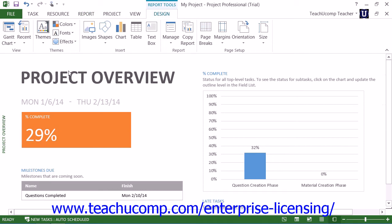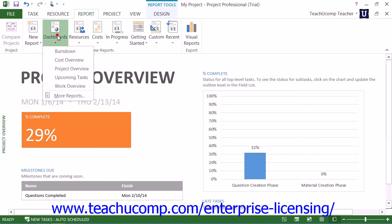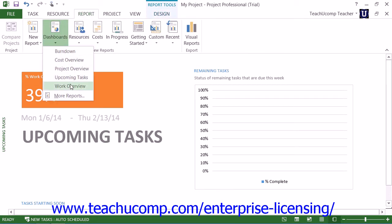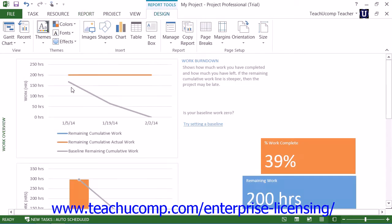The Project Overview is a report that shows how much of your project is complete. It also shows upcoming milestones and any late tasks. The Upcoming Tasks report shows the current week's work, the status of remaining tasks that were due, and the tasks scheduled to start in the next week. The Work Overview shows a work burndown for your project and the work stats for all top-level tasks, so you will know the percentage of completion and what work is remaining.